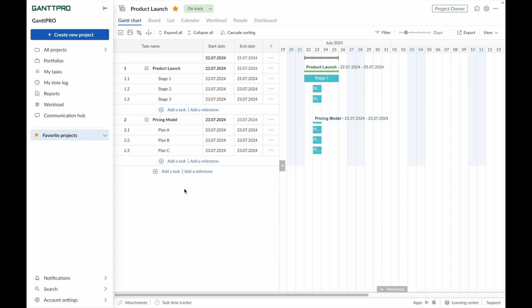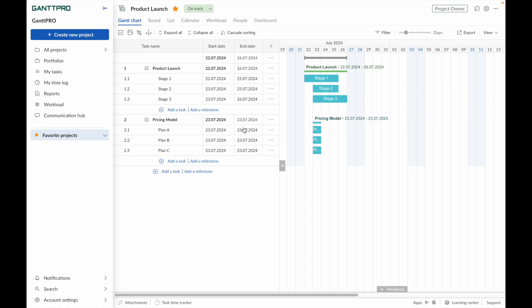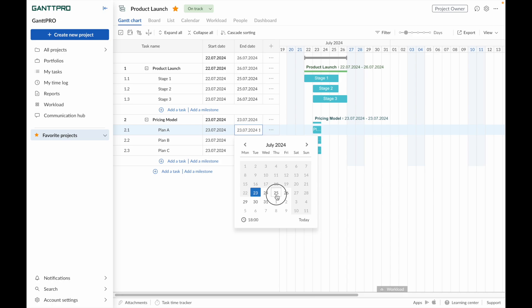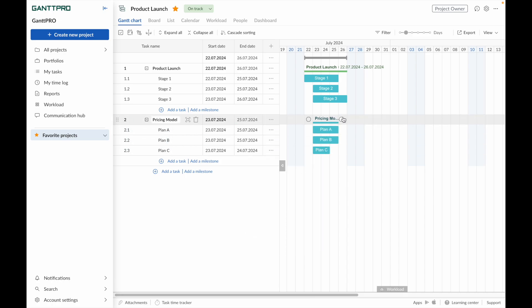Now, let's set tasks start and end dates. This can be done in two ways. Stretch and move tasks directly on the Gantt chart, or change the start and end dates in the corresponding fields in the grid.